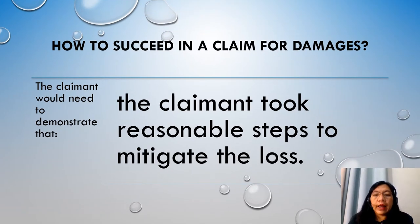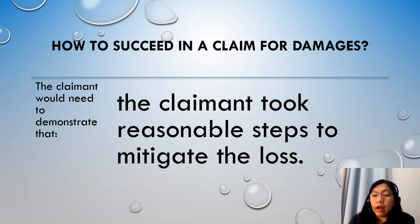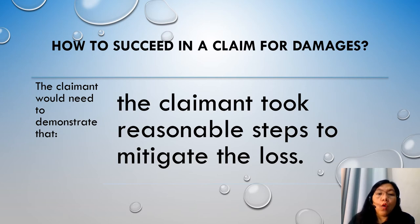Third, the claimant must take reasonable steps to mitigate the loss — there is a requirement for mitigation. Even where causation and remoteness have been established in relation to loss, any recoverable damages can be affected if the claimant has failed to mitigate their loss. Mitigation in law is the principle that a party who has suffered loss from a breach of contract has to take reasonable action to minimize the amount of that loss. An injured party cannot recover damages for any loss, even if caused by a breach of contract, which could have been avoided by taking reasonable steps.